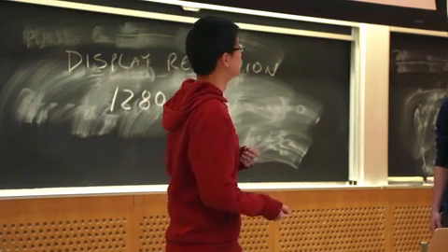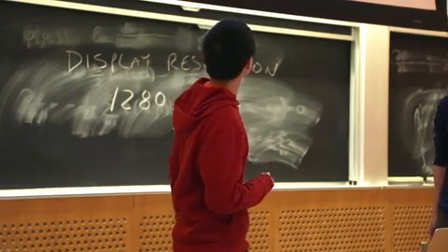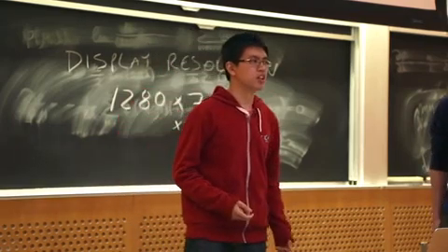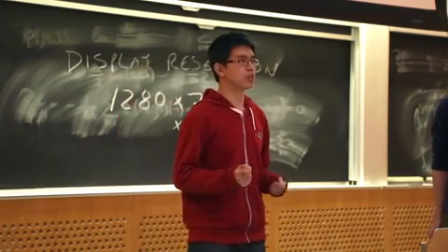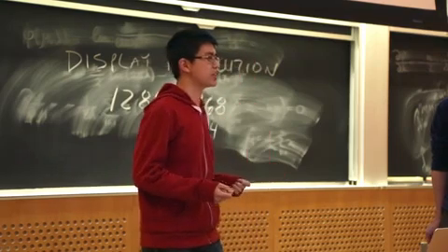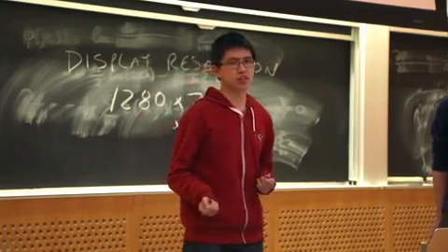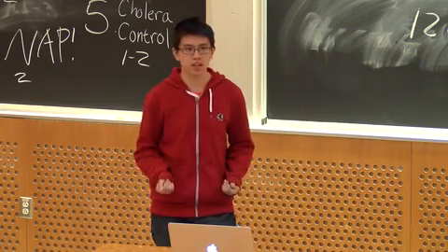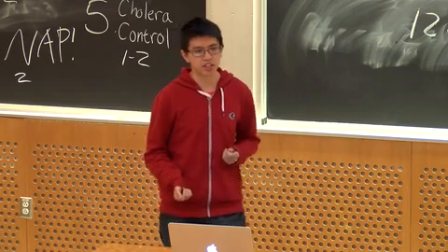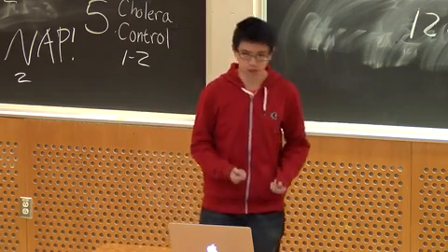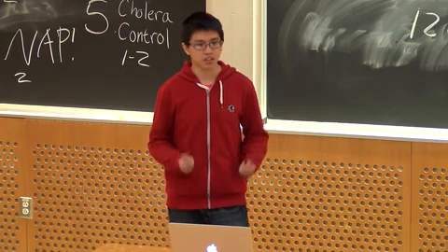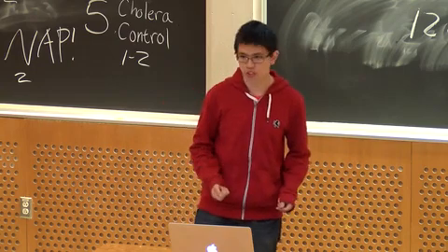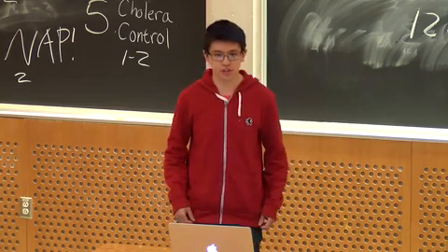This really was due to this second bad decision that we kept the game and its direction too vague for too long. We always were holding out that, oh, maybe we'll be able to come up with a better game idea, or maybe we'll find some magic solution to how we can make forecast-based financing into a game. And because of this mindset, we spent probably the first half of the project just staying too vague. And that hurt us in the end because we spent so much time going in all these different directions.